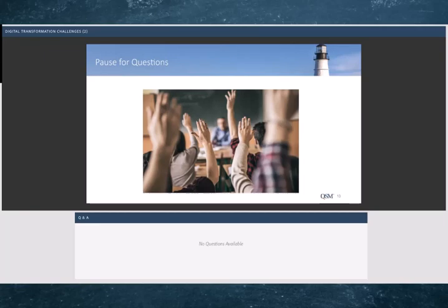We would start at the release level. If you're doing Agile, we could use story points, epics, user stories, or features. For folks that are not doing Agile, anything that you're comfortable with as far as measuring functionality and that you can be consistent with is what we would recommend. I'm going to show some examples as we go through the webinar. Sizing is one of the challenges that we face, and I'll show you some examples. But definitely story points is an option.